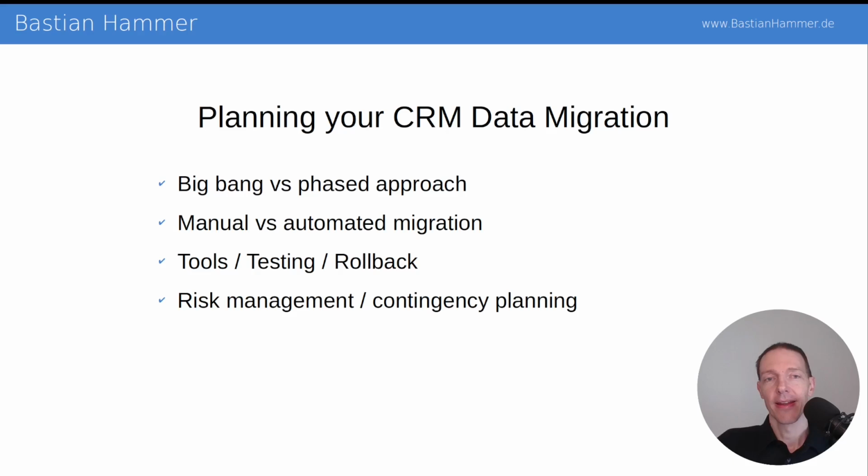Testing. Don't do this as an IT project and test in IT. Get your actual users, sales, marketing, customer service to test. Even if it's not complete yet, maybe you can help them to point out what exactly to test. They should be looking into their data because they know the data better than the IT usually. And therefore, testing is very important, especially if you're doing a big bang, like one switch over and finished.